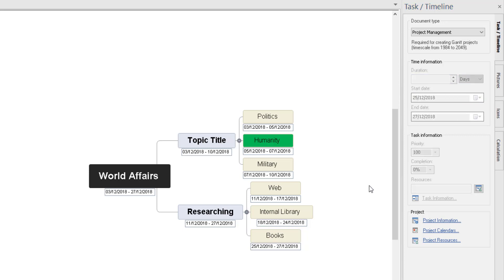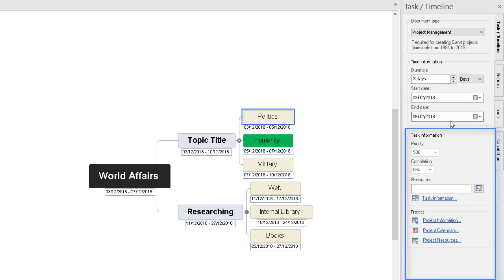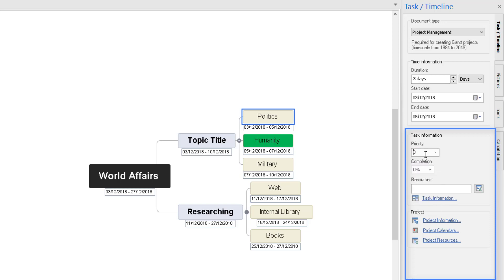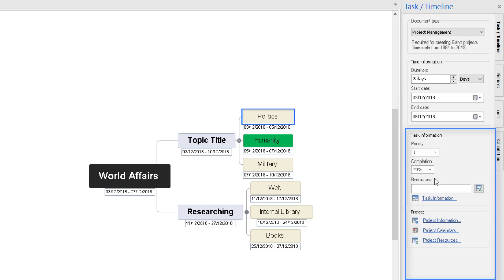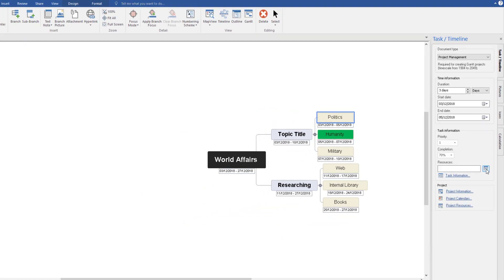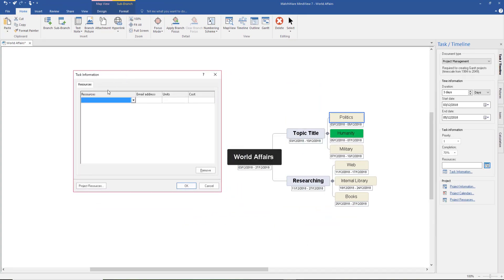I'm going to click back on politics and look at the options on the right. Under task information, you can select priority from 0 for no priority at all, or up to 1000 for top priority — though you might prefer to just use 1 to 10. In those few days researching politics, you might say you don't need to be 100% finished — just 60 or 70% to give yourself an idea. You can add 70% completion. Resources comes into its own when you need to add someone to do a task and pay them — for example, adding an accountant with their email.